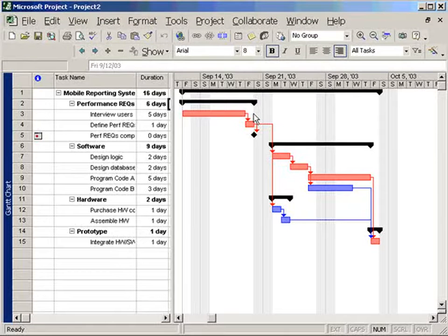And I'm going to discuss how to assess the sensitivity of a network. One common mistake students make is that they assume when we use the term sensitivity, we are referring to the likelihood that the project will take longer than planned. In reality, we use the term sensitivity to reflect the likelihood that the original critical path will change.